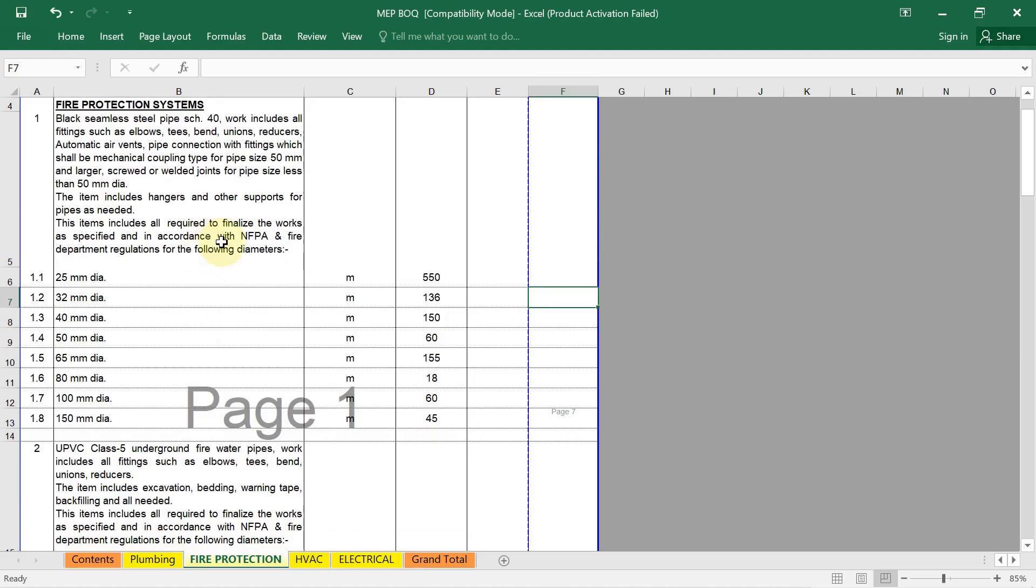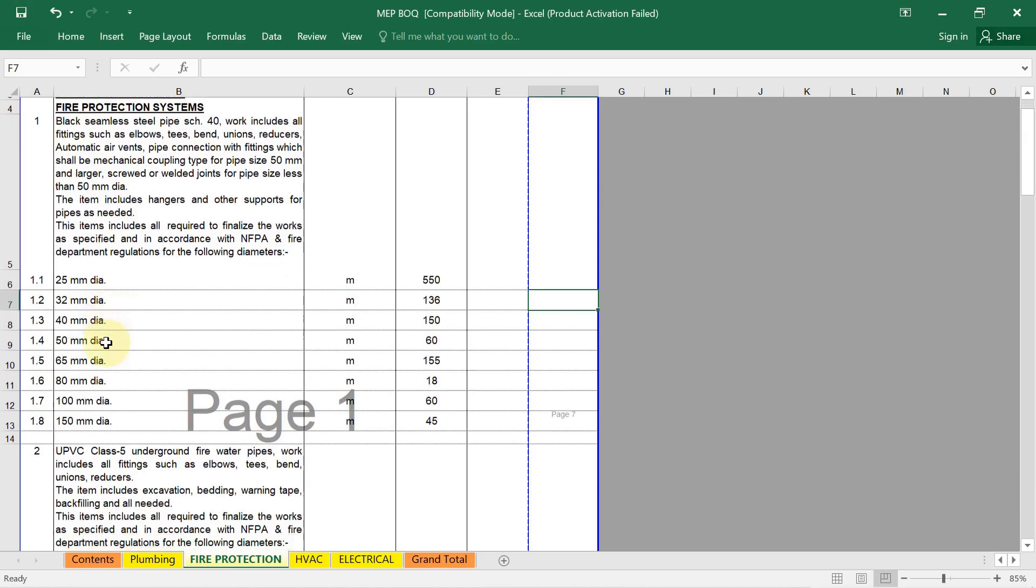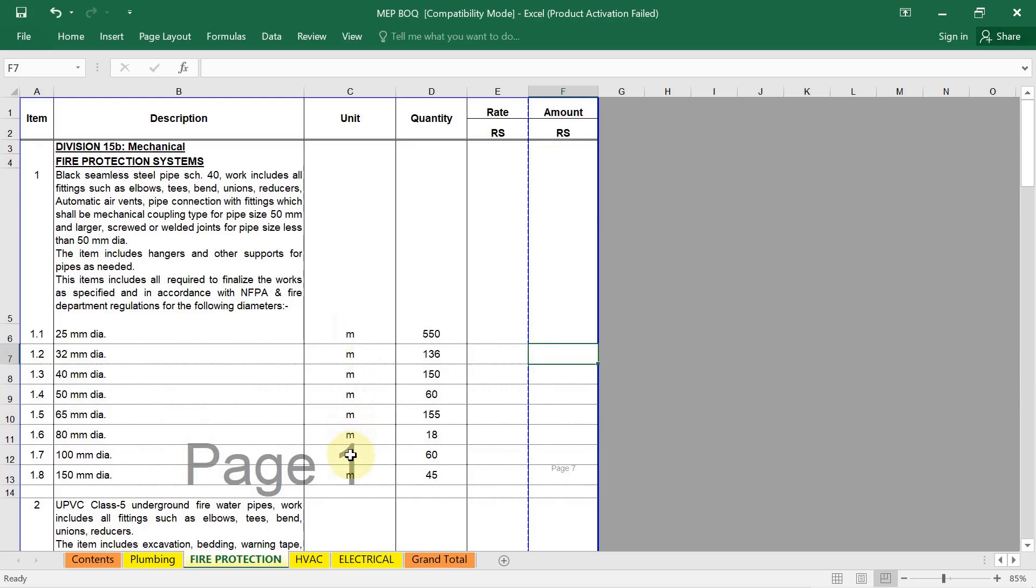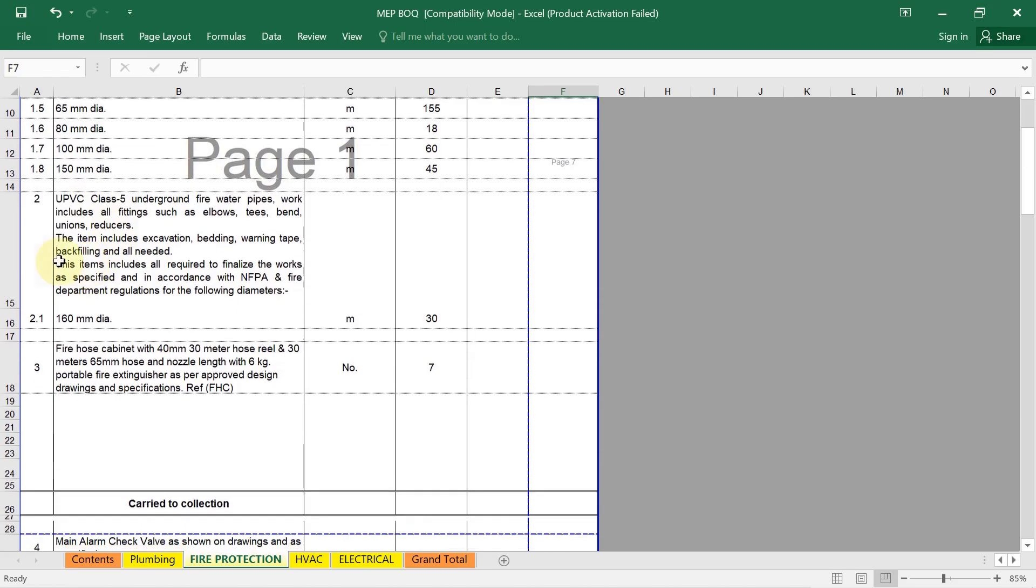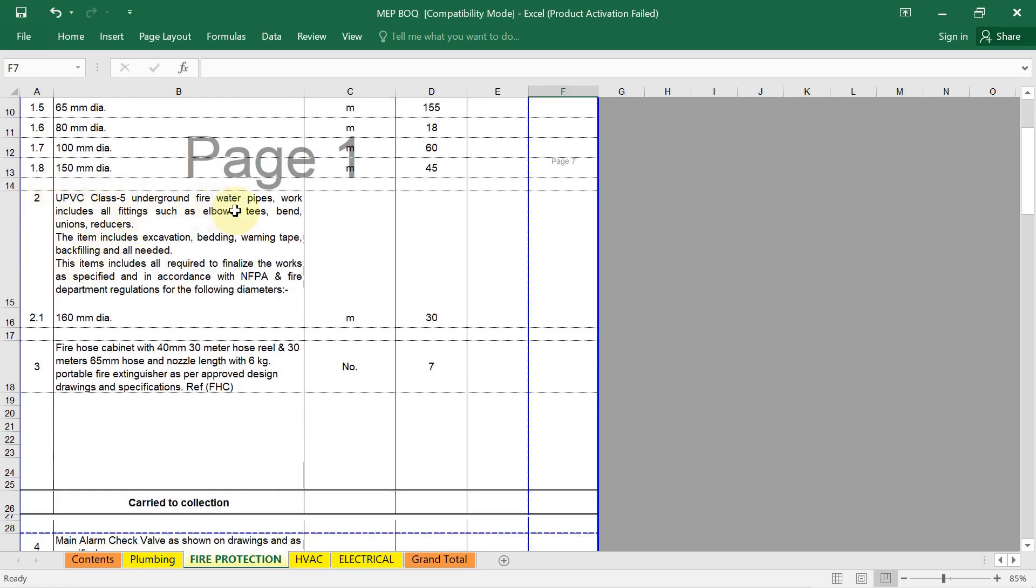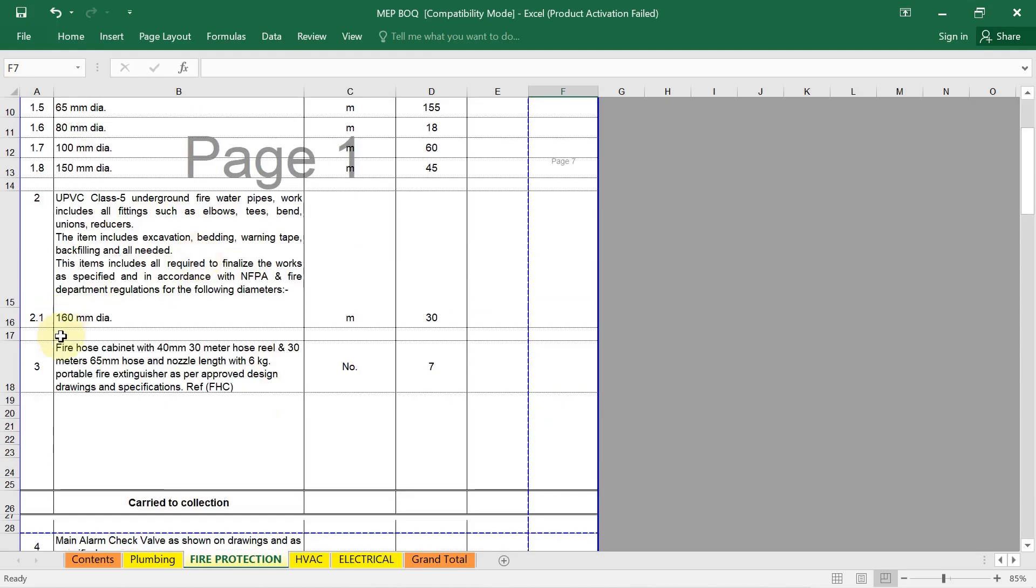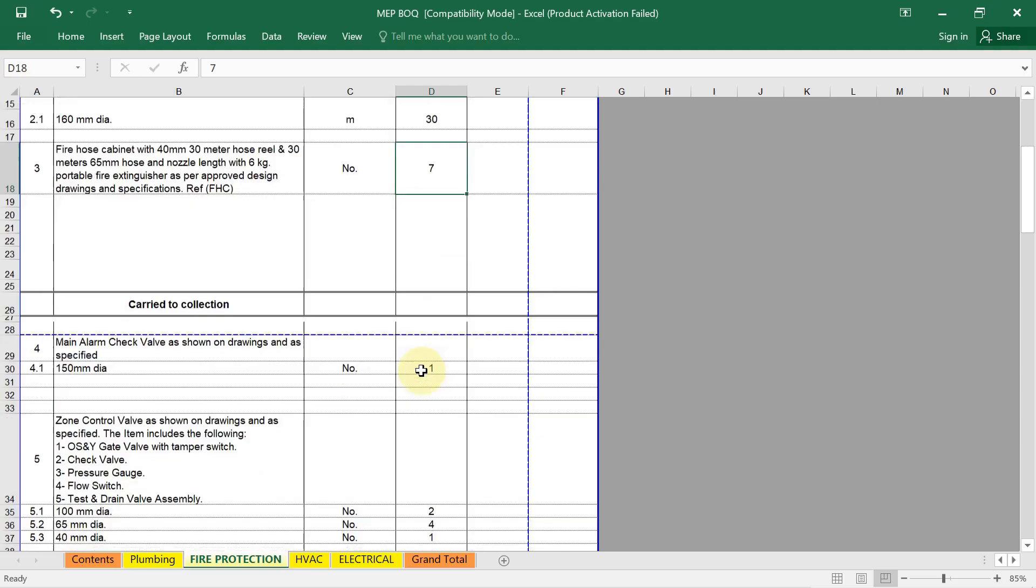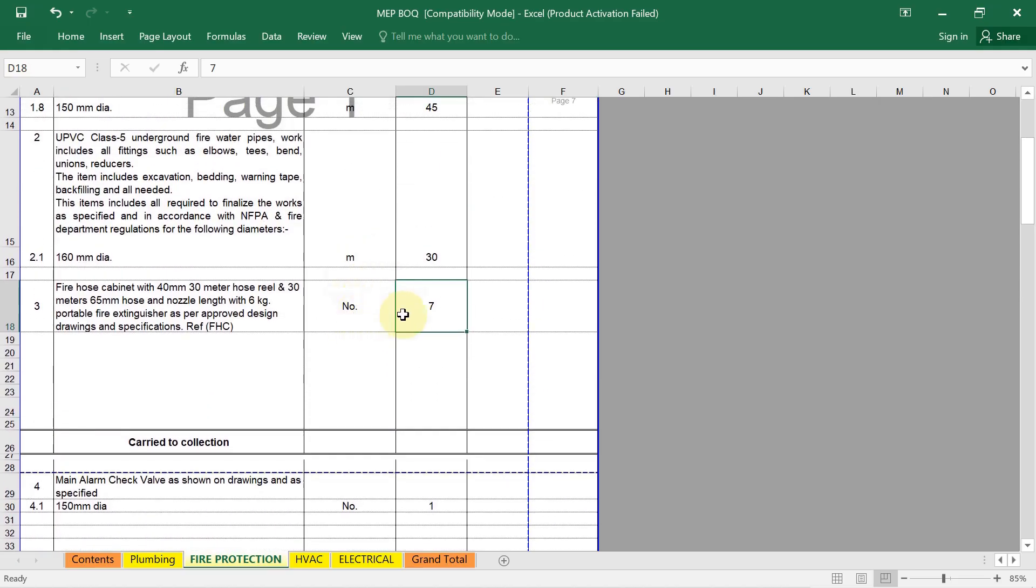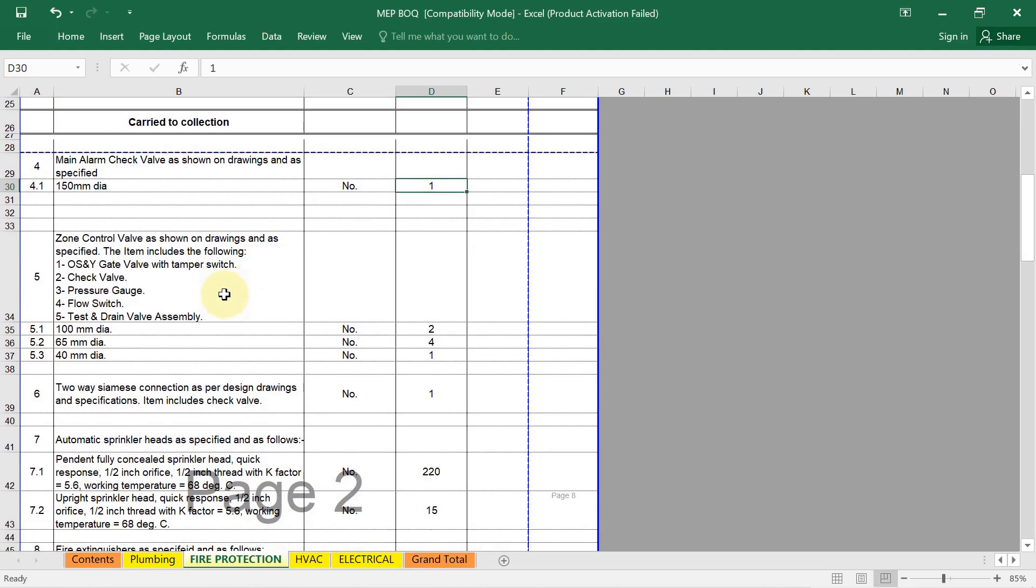Now let's see. Here I have shown you the example structure for a firefighting BOQ. First, the fire protection system, the pipes which we are using, the different diameters, unit measurement, then quantity, whatever you have got, just write down. Then the UPC class 5 underground fire water pipe, their quantity and diameter. If in your project you are using fire hose cabinet, see their detail in description. Detail is written: 40mm 30 meter hose reel and 30 meter 65mm hose and nozzle length with 6kg portable fire extinguisher. How much quantity, their detail, the unit of measurement number, their quantity is needed here. Same way, the main alarm check valve. In your project, if you are using zone control valve.